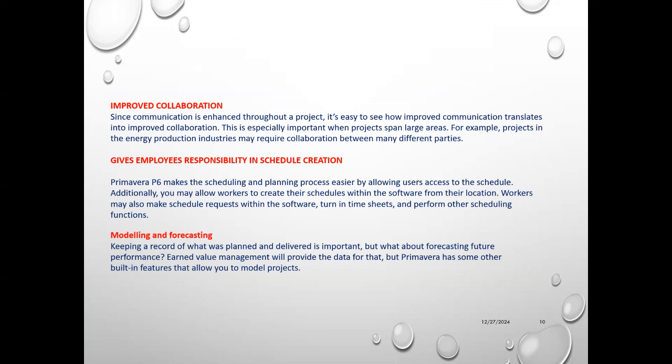Give employees responsibility for the schedule creation. So this is what you talk about. When you create the schedule, we will make sure that you, as a planner or as a person who is responsible, are not going to create it by yourself. You will involve the various stakeholders in the project, especially those who are going to do the actual work on site, because their input is very, very important to create a realistic project schedule.